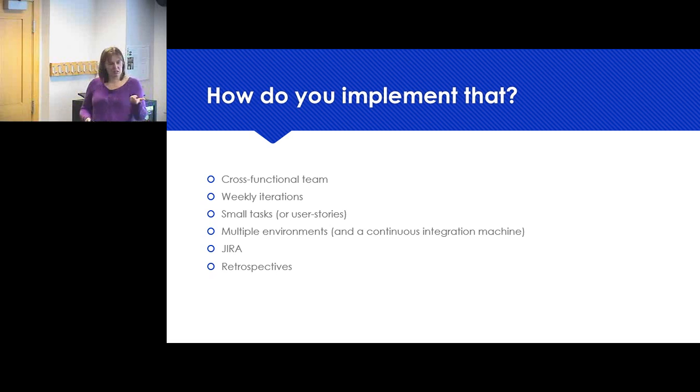But if you've got, create this toggle that brings up a new page and has a header on there, that's easy to estimate, right? Because it's small. It's very defined. Okay, put a new table on there that has this information in it. Again, small, well-defined, easy to estimate. So keep all of your things as small, well-defined, and easy to estimate as possible, and it's going to make your life easier when you're developing it.